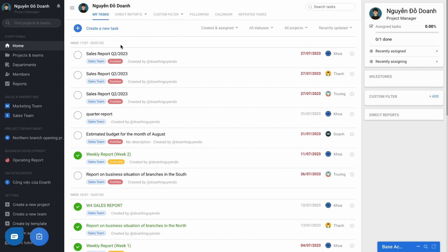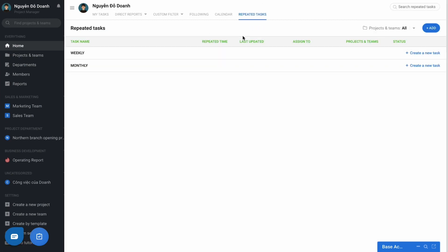You can set up by going to the home page, using the repeated task feature. Then just create the first one, and then later the software will automatically produce the work according to the set cycle.